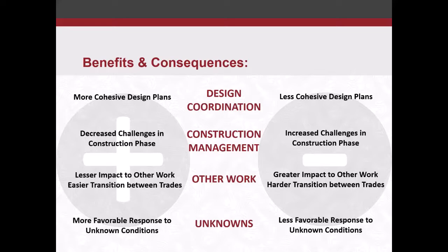And some other work: how does hazardous materials abatement design affect other work? Obviously if you don't get everything done in the first shot, that's going to limit what people can come in and do after. They might run into roadblocks and they might have to stop their work to do some more abatement. You don't want that. You want to get all that abatement done up front so others can go in and do their work without hindrance.